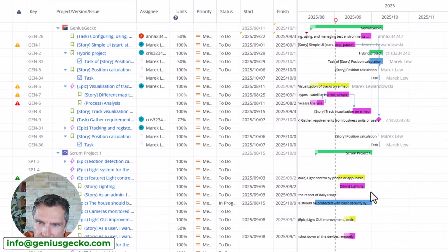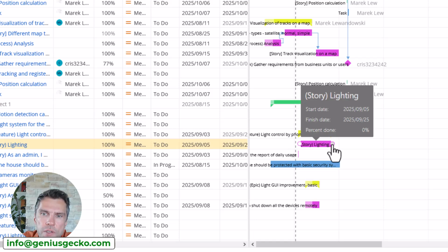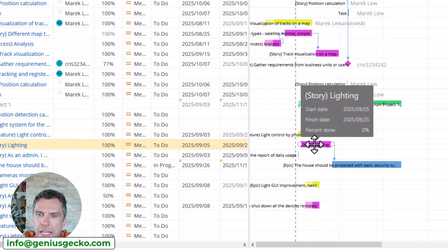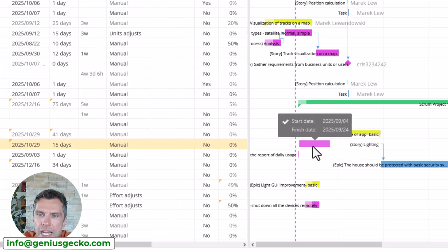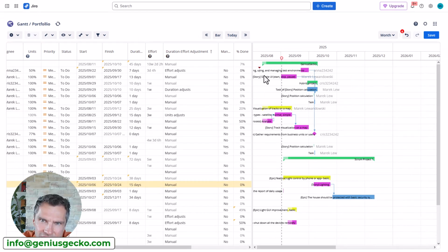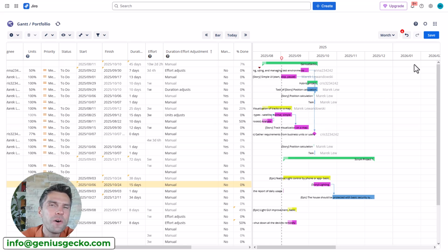That's a simple filter. I also have tasks, so they disappeared from the list and they are showing up now. I did talk a little bit about the links, so these are pretty straightforward and standard to Gantt chart. So all you need to do is just drag and drop, and whenever auto scheduling is enabled, all the linked issues will be adjusted automatically for you. Also on the taskbars, you actually see the progress. So if you hover over the task, you will see that the percentage complete is 5%, which is indicated with this bar right here.